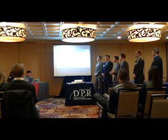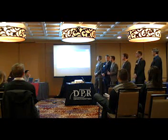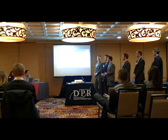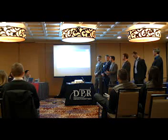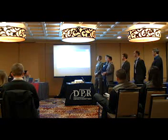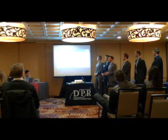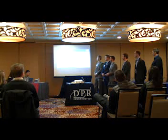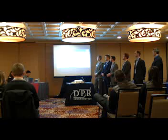Like you said, there's not just project risk on this project, there's some contractual language that we need to take into account. We were looking at both contract A and contract B. Contract A, first and foremost, is a ConsensusDocs 300 document, and it's structured very similar to an IPD format for a contract, where it's a multi-party agreement with the owner, the designer, and the contractor all together in one contract. This actually allocates and shares risks and reward across those three parties.